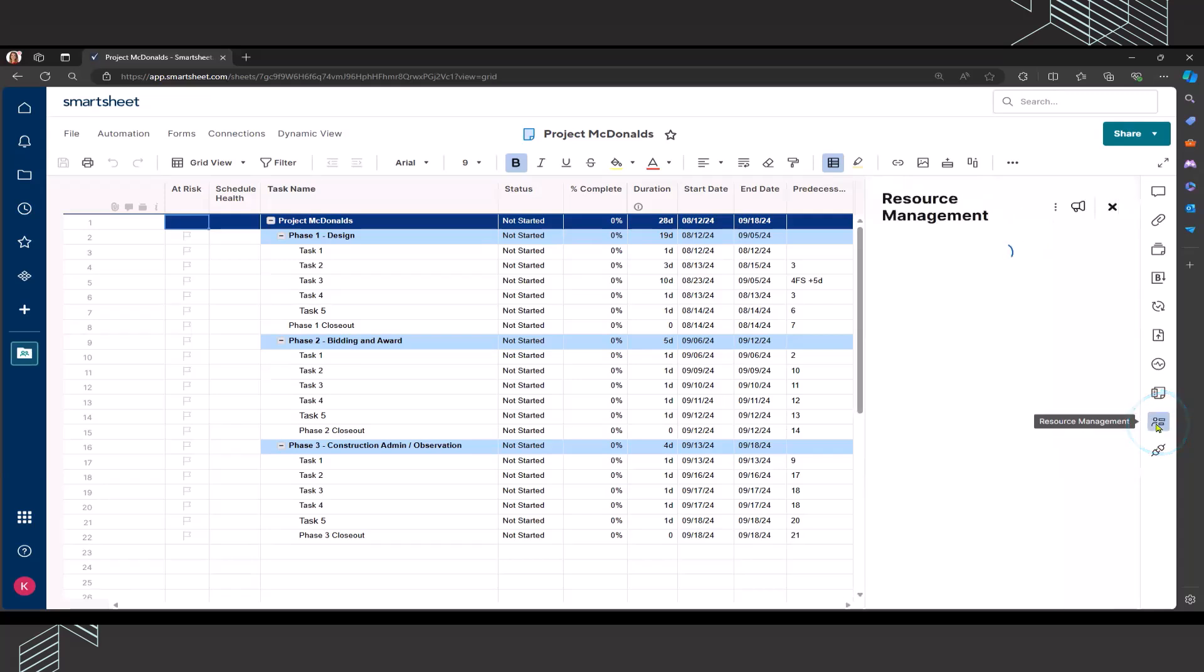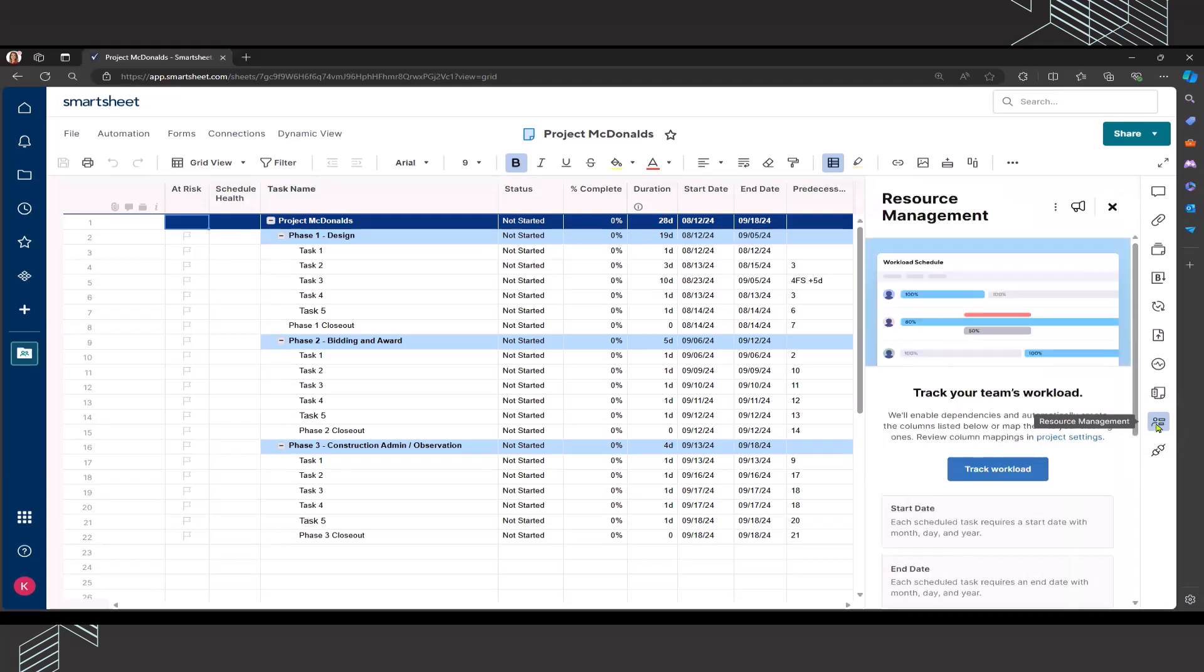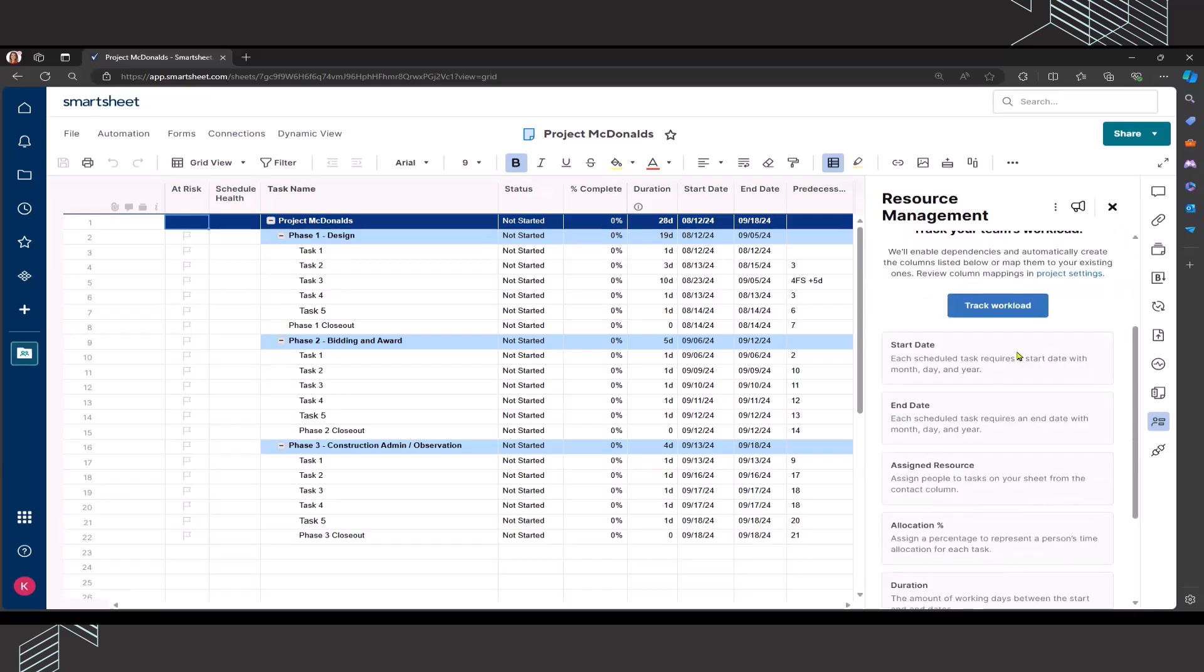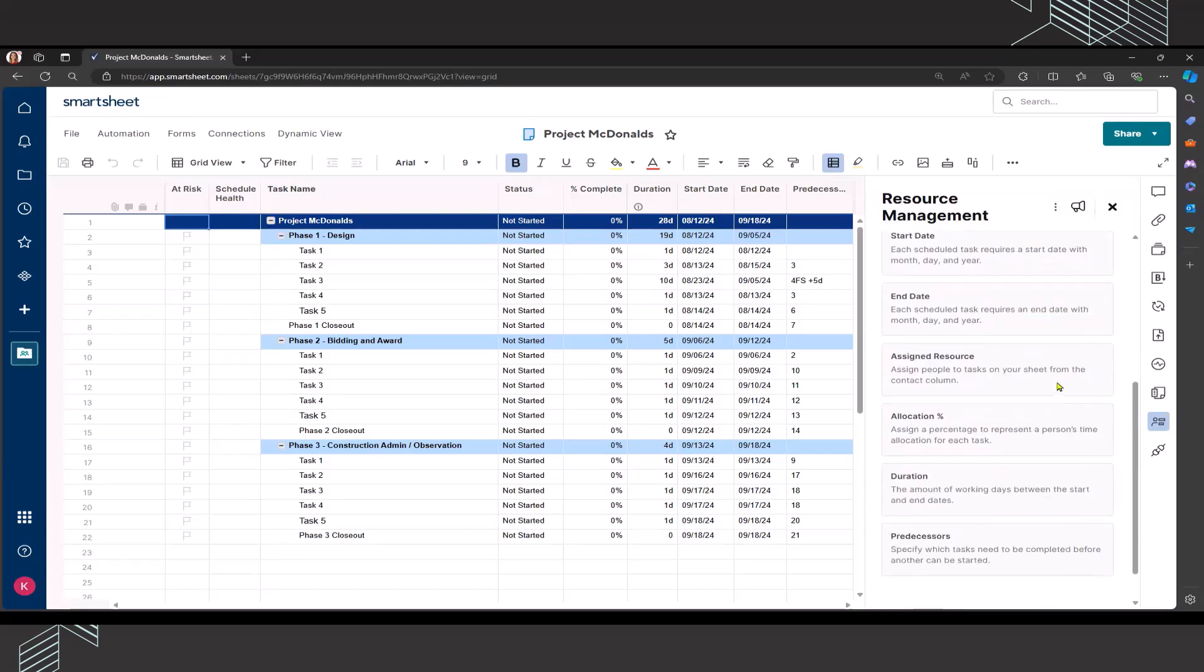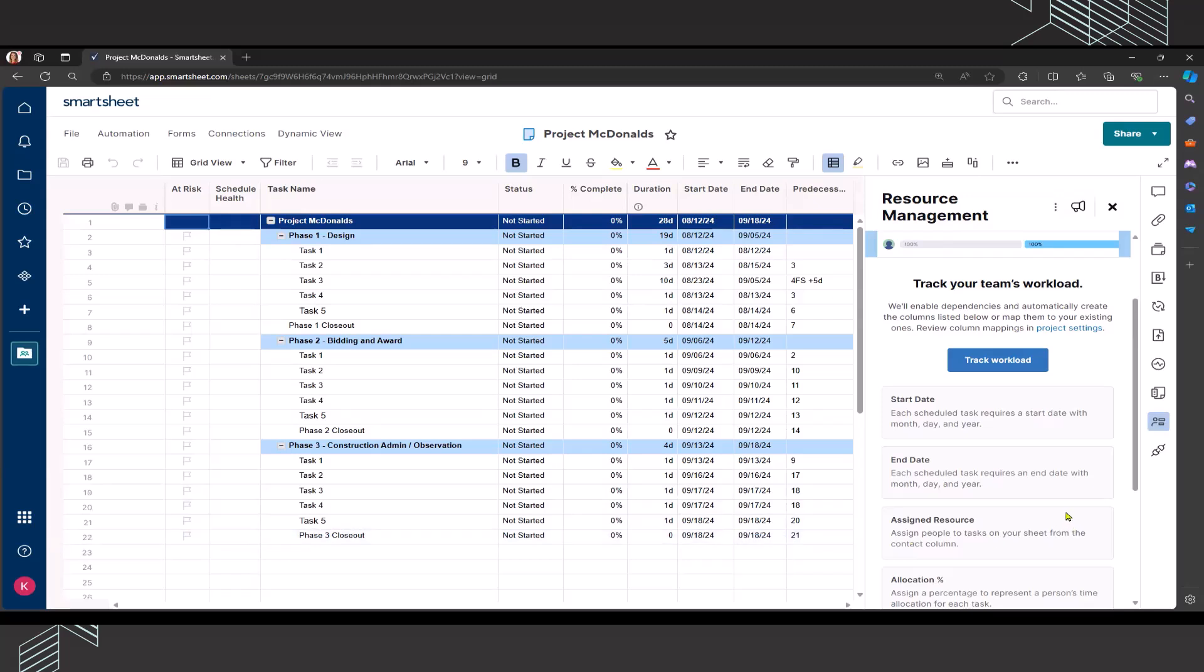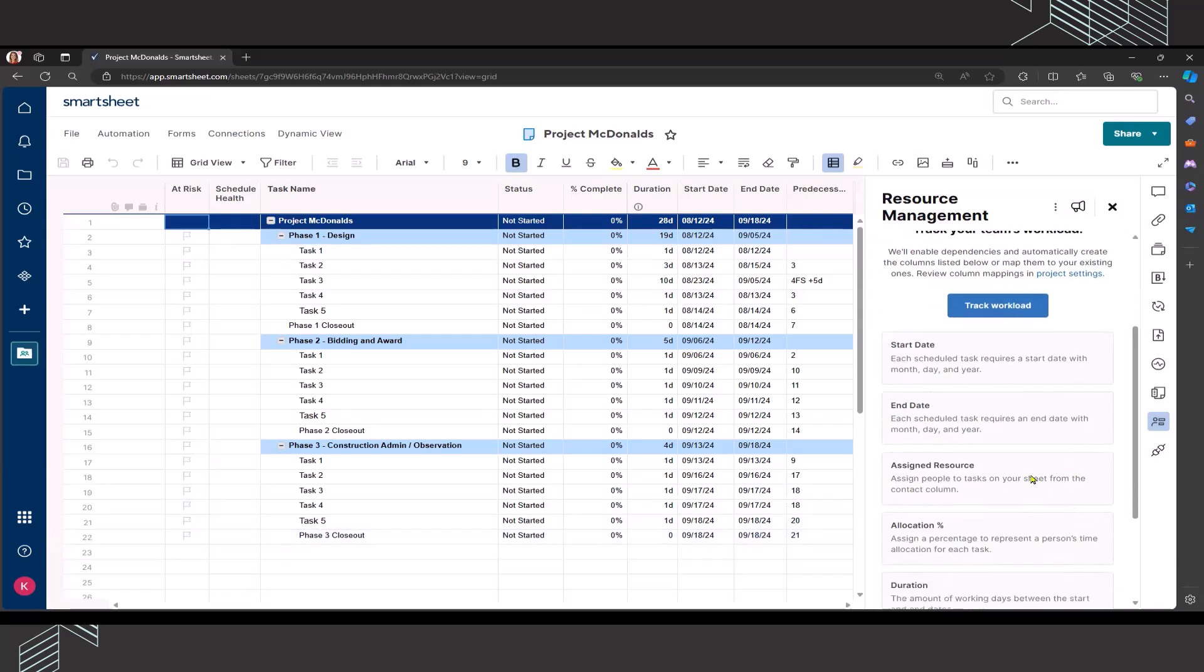I mentioned earlier that the resource management tile on the far right-hand side is going to be what we want to click in order to access our resource management or our workload management. When you first click on that, nothing is enabled for tracking workload. It does give you some pointers and informs you that you need to have a start date and end date and assigned resource allocation percentage, duration, and predecessors set up in order to utilize the resource management functionality.